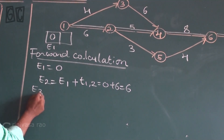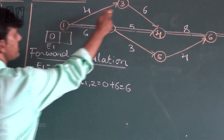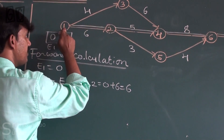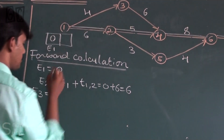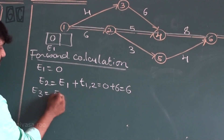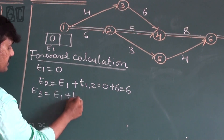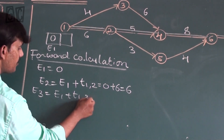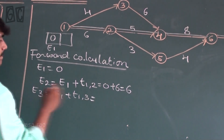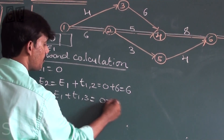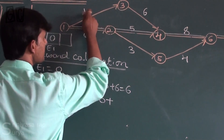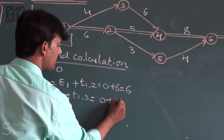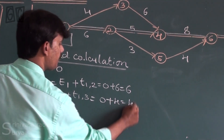Now E3: E3 is coming from E1 plus time taken from 1 to 3, so E3 equals 0 plus 4, which gives E3 equal to 4.